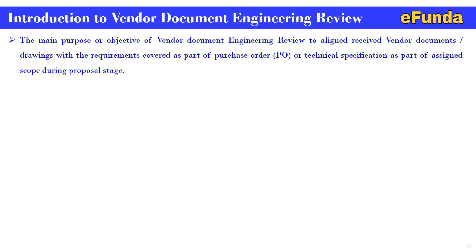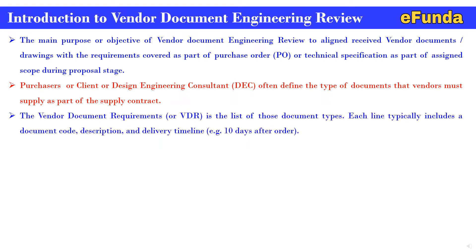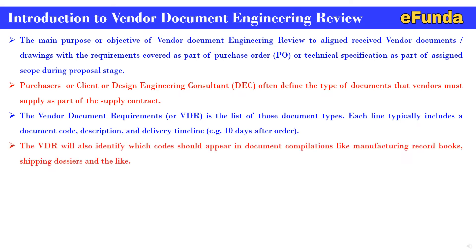The main purpose of vendor document engineering review is to align received vendor documents or drawings with requirements covered as part of the purchase order (PO) or technical specification. During the proposal stage, the purchaser, client, or design engineering consultant (DEC) defines the type of documents the vendor must supply as part of the supply contract. The vendor document requirement (VDR) is the list of those document types — each line typically includes a document code, description, and delivery time, for example, 10 days after the order.